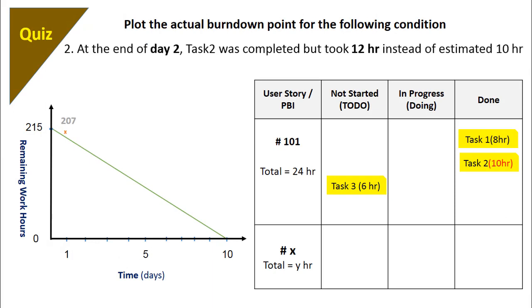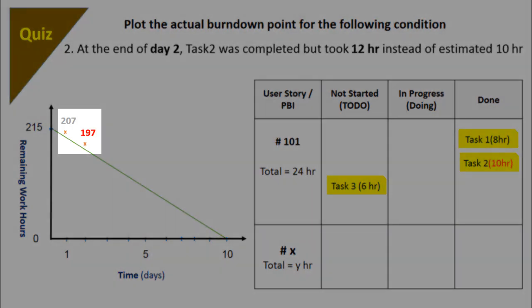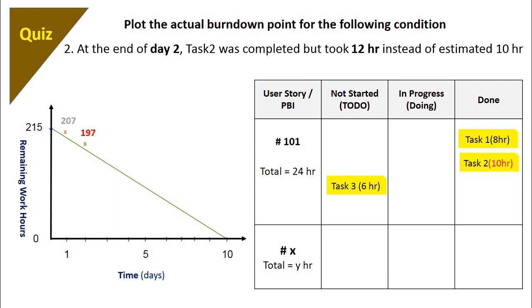Now, if at the end of day two, task two was completed but took 12 hours instead of 10 hours, plot the actual burndown point. We need to remember that the burndown chart is all about plotting the remaining work hours. So even if the completed task took more than the estimated hours, this is not going to affect the remaining work hours in any way. So the remaining work hours will be 207 minus 10 equals 197. If you remember, we have kept some contingency buffer. This extra time will be absorbed here. Some additional time may get added to the buffer if any task finishes early.